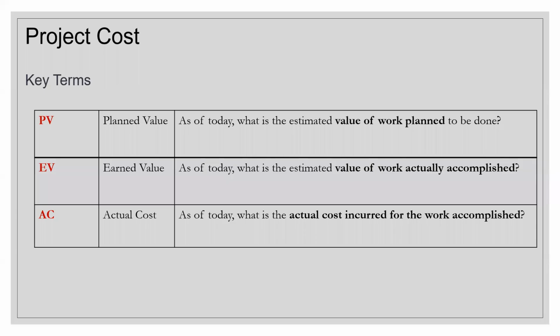Once your schedule is completely done, it will be very easy to plug in the cost. Because if you know each of your activities and in which sequence or in parallel they are supposed to be done depending on the dependency, then you will also know the duration of these activities. And when you know the duration, you will know how many man hours you need and how much resource cost, plus the services cost or the hardware or software cost you need for this particular activity.